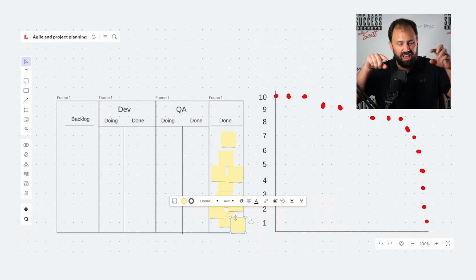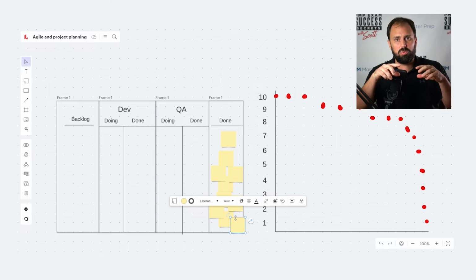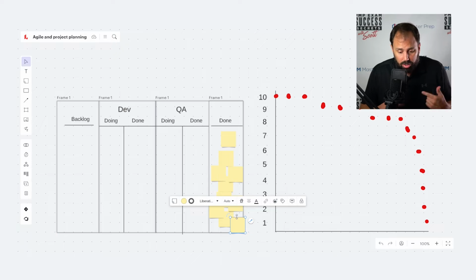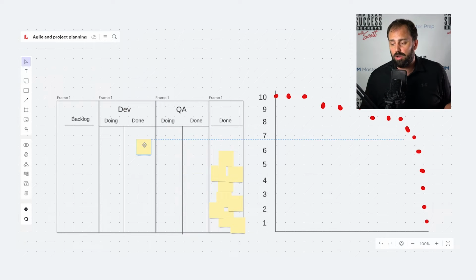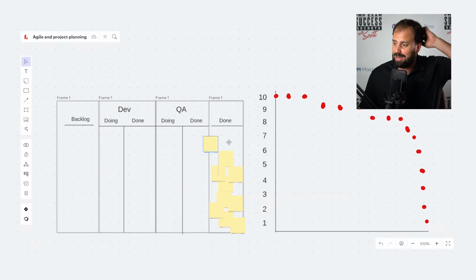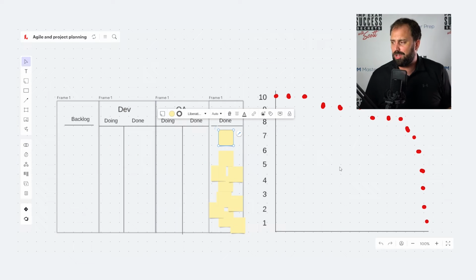Thinking in increments, in sprints, iterations, just trying to time box in a sense, what would happen if there was no time box? As we go through the flow, the work in QA would just stack up, stack up, stack up, and the dev people would just be working. And then as they get down the road, the stuff that they're working on, man, devs worked on that weeks ago. It's just stacking up. Finally, they get it. Maybe it's not fresh in their mind. It takes longer to fix it. And there's this frantic push to go down.